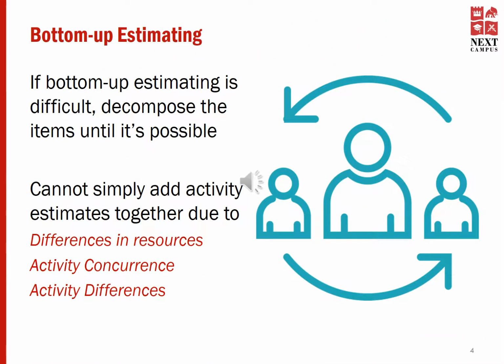If you find bottom-up estimating difficult to accomplish, it may be that your activities simply aren't decomposed enough. You want to have a good grasp on how long each portion of an activity will take for a resource to complete and have a good idea of what that resource's cost will be in terms of time and material. If you're not yet certain of that, you might want to speak to subject matter experts on your project team to understand those activities better and help break them down into small, easier to manage pieces. This can come in handy both with scheduling and estimating.